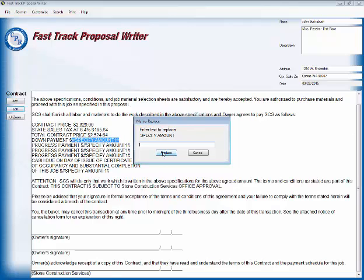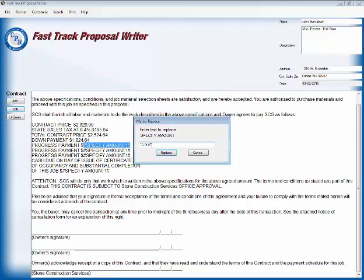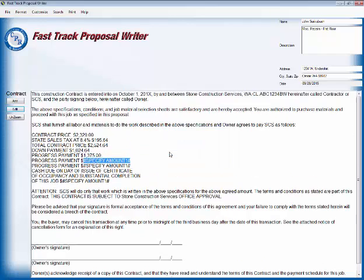Total contract price then is $2,524.64. Contract amount. Down payment. Should be roughly on a small job like this, you'd get about 40% down payment. Now, if you live in the state of California where they specify that you can only be $1,000 or 10% of the contract price, whichever is less, then you just have to adjust accordingly. But for the rest of us, our down payment would be roughly 40%, which will be 1,024.64 to round the numbers off. Remember, your contract price said 64 cents. We're going to get rid of that as soon as we can. So we replace. Our first progress payment then will be $1,375.00. And let's replace.